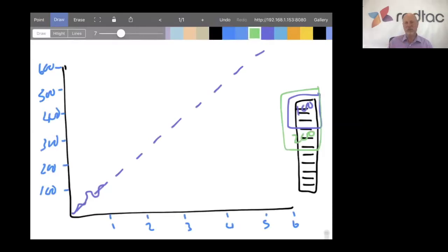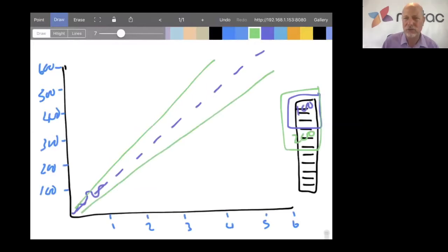We don't want to be deterministic, we want to be probabilistic. So thinking about probabilities, how likely is it that we'll hit that? So we start to put a cone of uncertainty around this. Now, obviously, if you've got a team who are very inexperienced, the cone of uncertainty is going to be very, very wide. If you have a team who are very experienced, the cone of uncertainty is going to be pretty narrow. Like this.